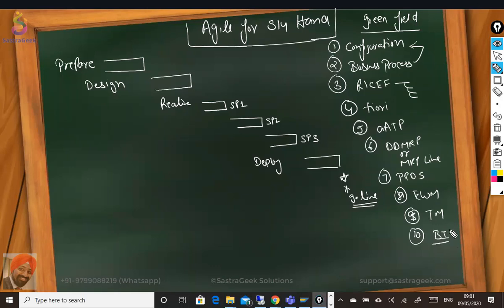So in the overall project scope, you need to divide your scope. And what is your scope? If you are able to divide your scope, you say that out of these business processes, there are some complicated business processes which right now I'm doing on third-party software. I can continue with that for the next 6 months to 1 year. So those business processes I drop. That will go later on SAP. But for my legacy system, whatever business processes we are going to stop, only those business processes we are putting in scope.